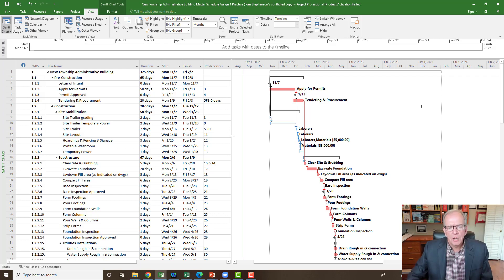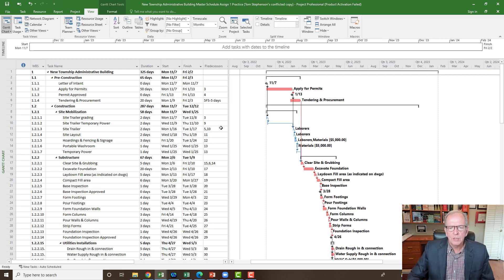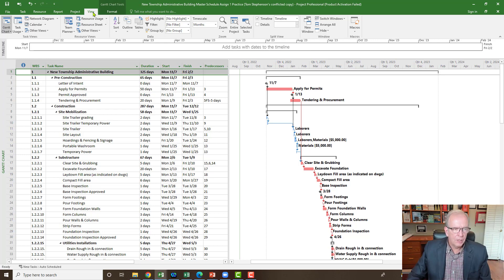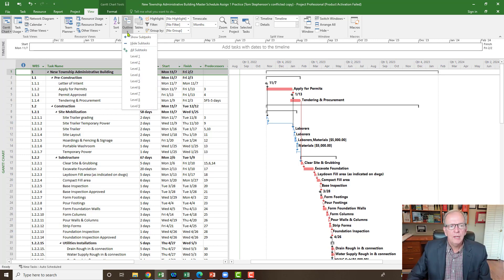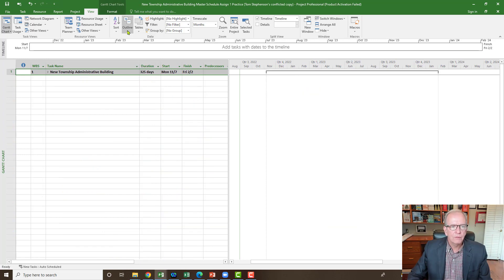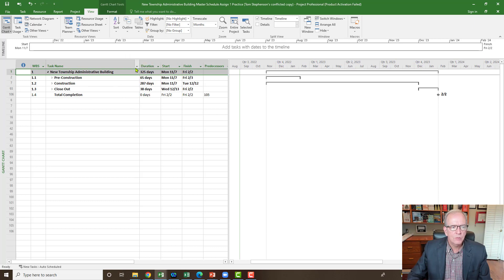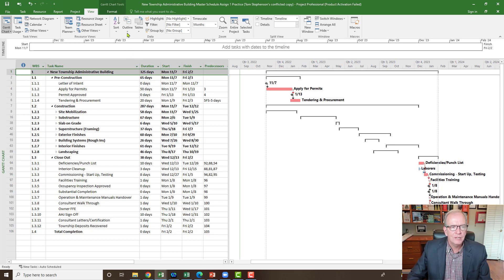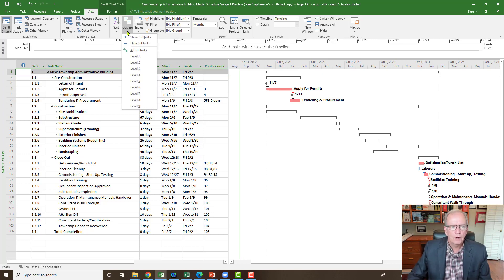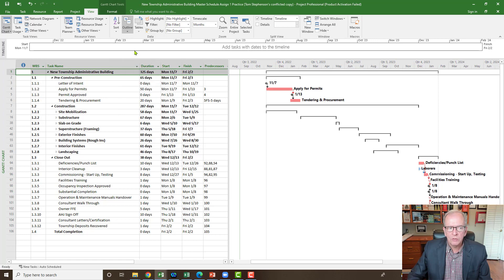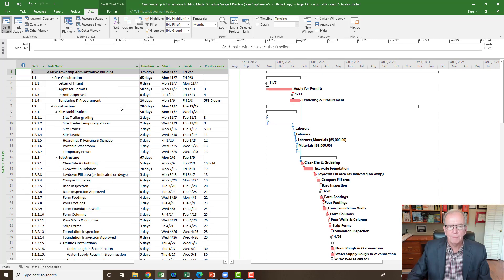So I've got this project here. And just to go over a few things with you, this project has a work breakdown structure. So it's got a different hierarchy. And of course, under the View tab, and that's right here, we can go to Outline, and we can say Outline for Level 1. We just see the Level 1 tasks. Outline for Level 2. We just see the Level 2. And so on, right? So we can see differing levels of detail. And that can be helpful when you might have a project that has several hundred activities or maybe more than a thousand activities. That can be helpful. Now, if I want to show everything underneath it, I can just say All Subtasks, and everything opens up. So that's great.